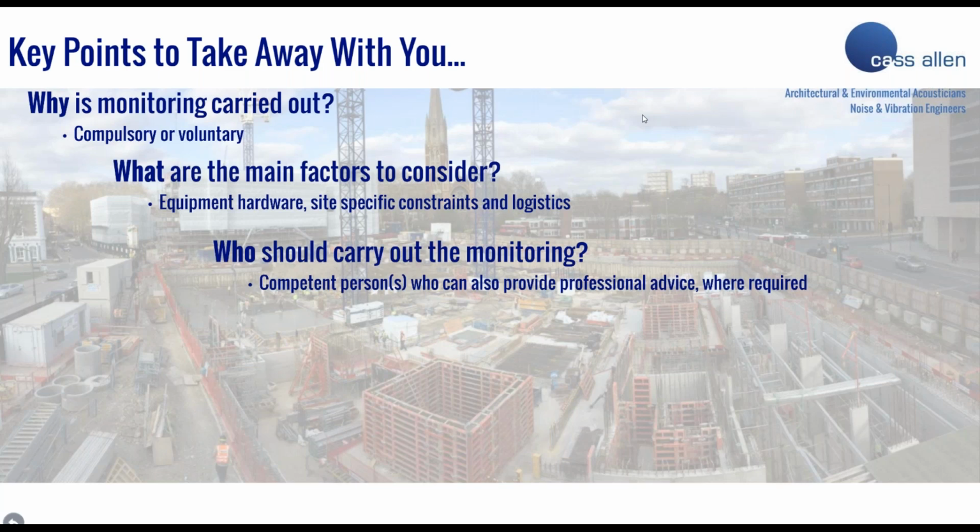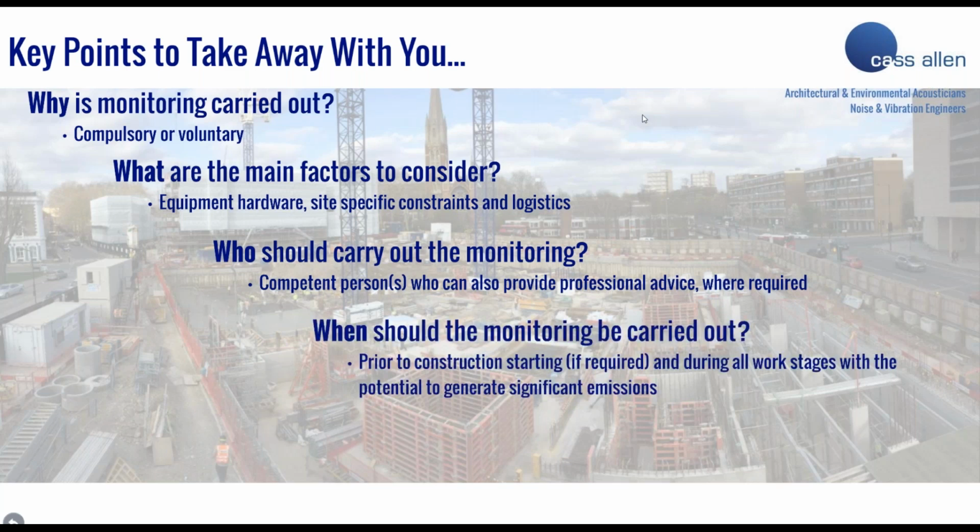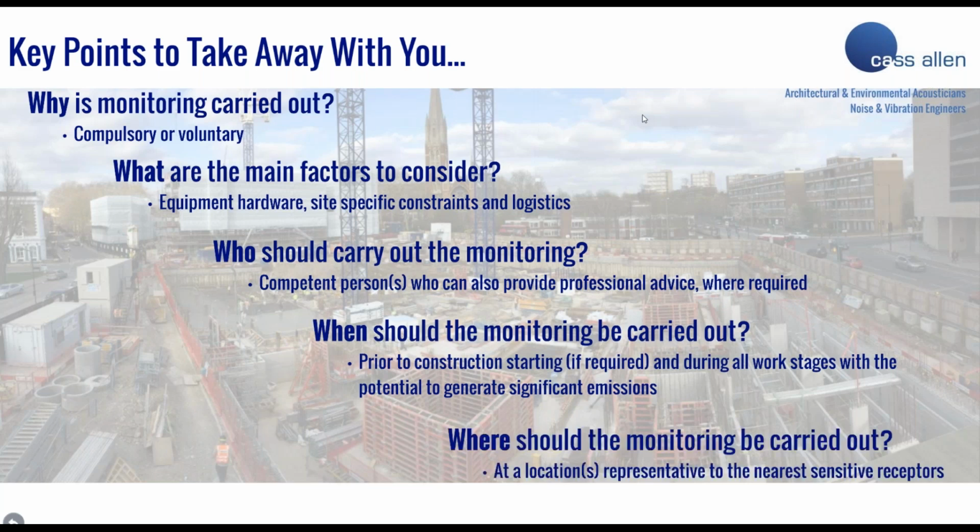That the monitoring should be carried out by competent persons who can also give professional advice where it's required. That the monitoring should be carried out either prior to works commencing and/or during all significant stages of the works that have the potential to generate significant emissions. And that finally, monitoring should be carried out at representative locations to nearby sensitive receptors, and ideally at as few locations as is necessary.